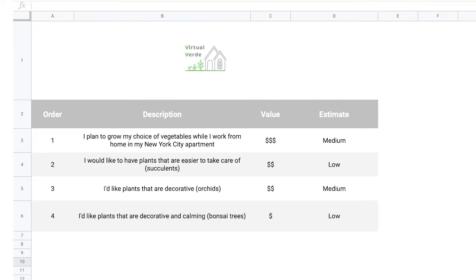The next attribute is the order. The backlog should always be prioritized. Both the estimate and value fields help the product owner figure out where to place an item in the backlog's order of hierarchy. A product owner may ask, 'How important is this backlog item compared to all the other items?' Product backlogs order items from highest to lowest priority — this is called a stacked rank. For example, Virtual Verde's market research found that people who work from home would much rather have easy-to-care-for plants than high-maintenance plants like orchids. So simple plants like succulents are prioritized higher.